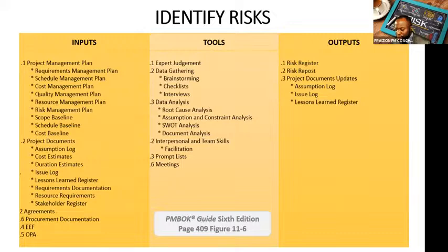So it says information in the risk report may include sources of overall project risk, indicating which are the most important drivers of overall project risk exposure, and summary information on identified individual project risk, like the number of identified threats, number of identified opportunities, how they are distributed, the distribution of risks across the categories, metrics, and trends. So short and sweet, high level, a tool that management can use.